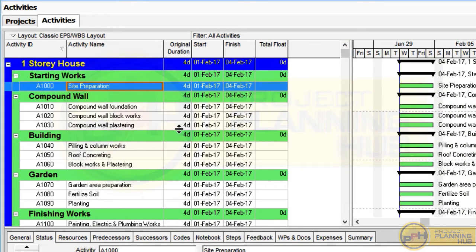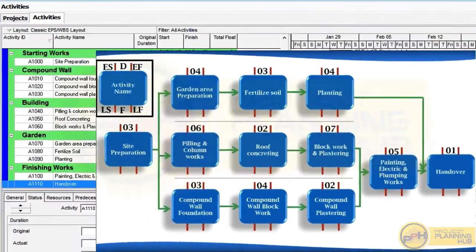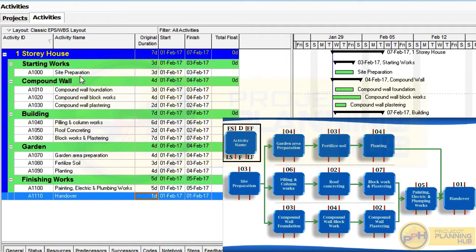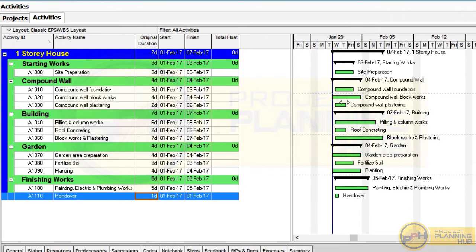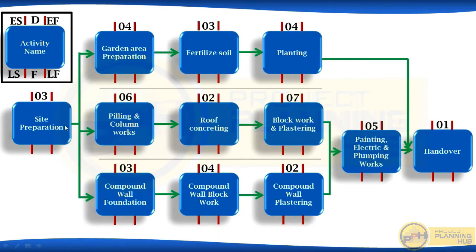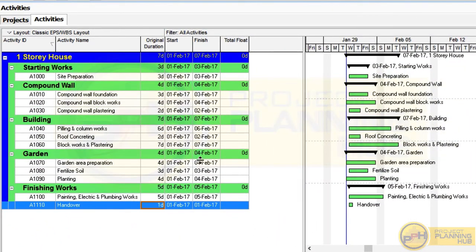Now all durations are shown in days with the letter D. Let's give durations to all activities using the same durations from our critical path session. All activities are given durations as shown in the picture. Presently there is no relationship between these activities in Primavera — by a relationship I mean the linkings connecting activities together. We need to give this connection in Primavera as well.